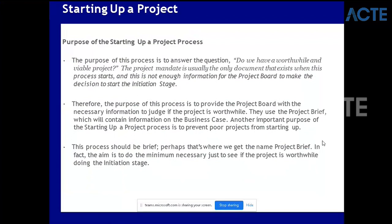The process should be brief - perhaps that's where we get the name 'project brief.' The aim is to do the minimum necessary just to see if the project is worthwhile to go into initiation. Startup of the project is just to go through the project charter and see whether the project makes sense, by creating a project brief. Inside the project brief you will have some high-level business case, and that will be presented to the stakeholder to get a buy-in at a high level.